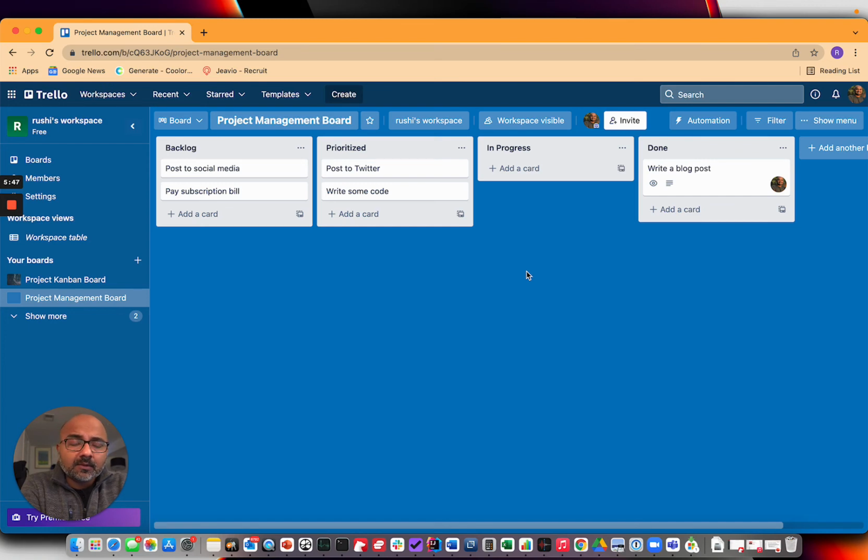So there might be times when doing some work outside of what has been agreed has to happen, right? It might be an urgent requirement, it might be some change during the week, whatever it is. But in most cases, we want to make sure that whatever work is being picked up has been prioritized through a well-defined prioritization process. At any given time, a person should only have one card or ticket associated with them in the in progress list or column.